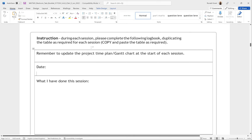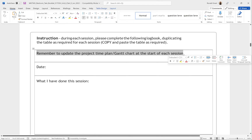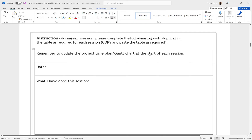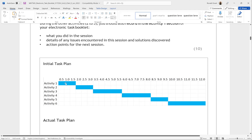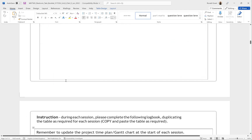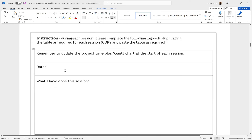Now it's time to start filling in the table. The instructions say: during each session, complete the following logbook, duplicating the table as required. Remember to update the project time plan — the Gantt chart — at the start of each session. So we're supposed to go back to Activity 1 and update the Gantt chart. For example, if Activity 1 only took one hour instead of the planned hour and a half, we go in and change that. You also fill in the date.